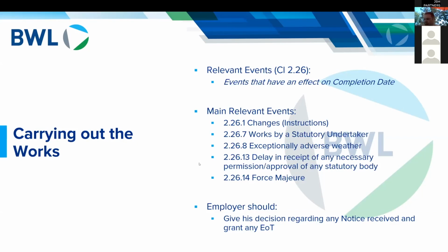Next bullet point down is necessary permissions, approvals of statutory bodies, so planning permission, conditions, etc. And perhaps, given that we're living within a COVID-19 environment, the last one, force majeure, is quite apt. Within the JCT world, and these relevant events are taken from the JCT contract, within the JCT contract, you won't find a definition of force majeure.